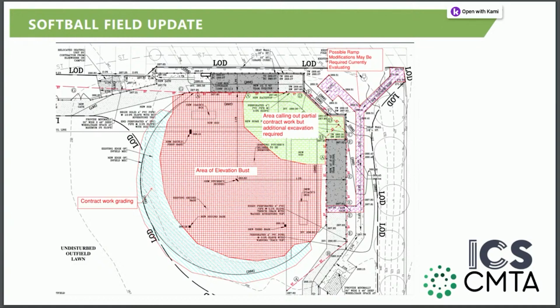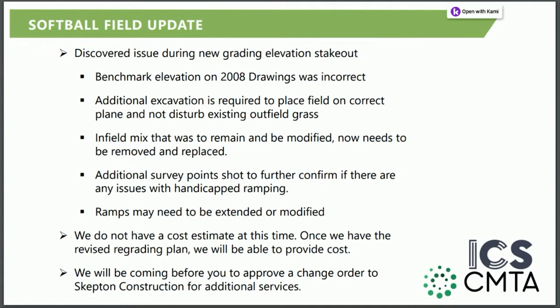There was some notes on that prior drawing that showed the ramps may have to be modified. We took some additional elevations, sent that to the architect, and this morning we received new elevations. None of the ramping and the sidewalks has to be touched. So it's only the infield that needs additional grading.